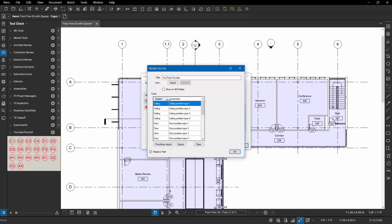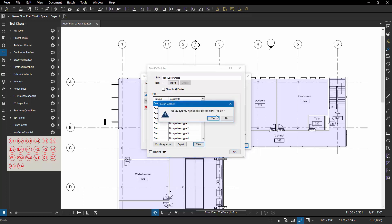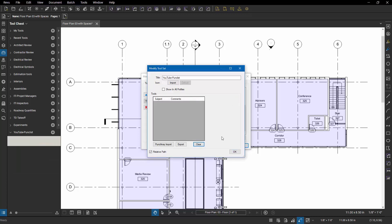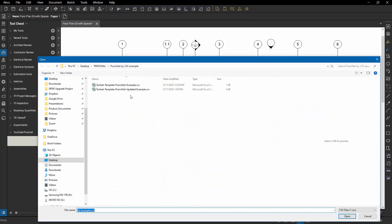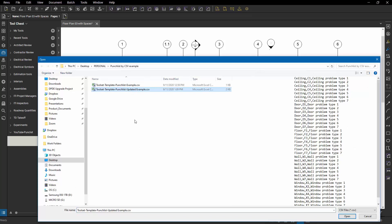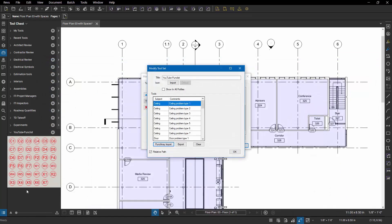But what if my list changes? That's super simple. You can always come back at a later date, go into your punch list tool set, clear it out. That doesn't have any impact on any symbols that have already been placed in any drawings. You can re-import your punch list. Here I've got an updated one. Open that. Rebuilds the entire thing with the same standards.